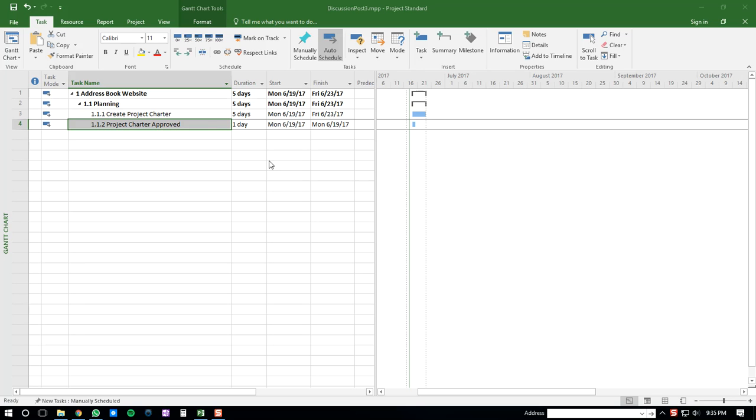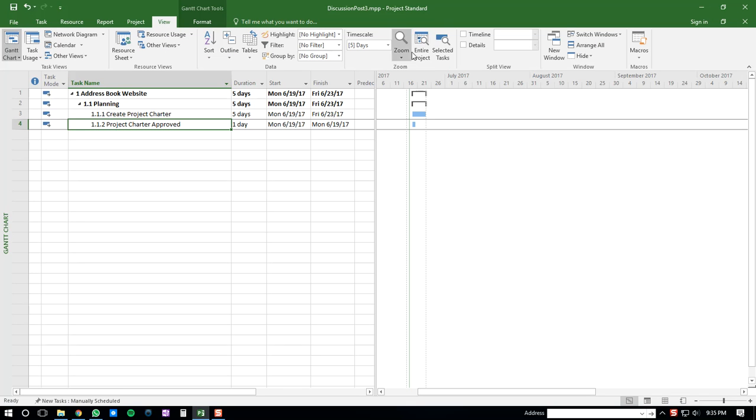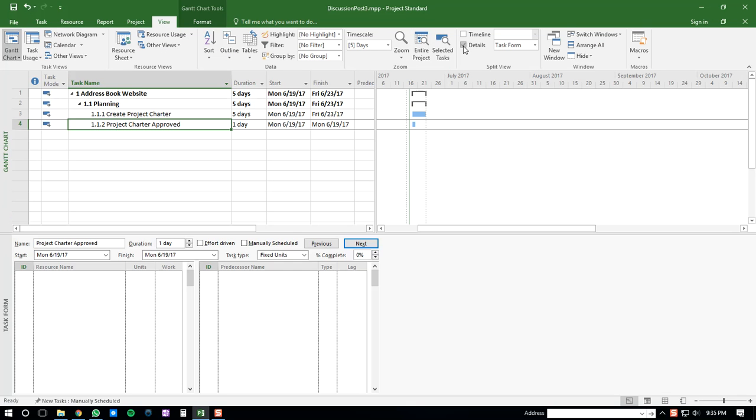So what you'll have to do to add a start-to-start dependency is you'll click on the bottom task, and then you will go to the View tab, and then you'll click the Details checkbox. Once you're here, and your bottom task is selected,